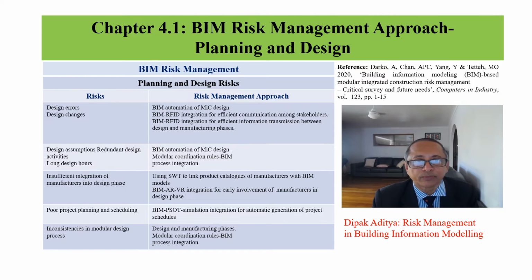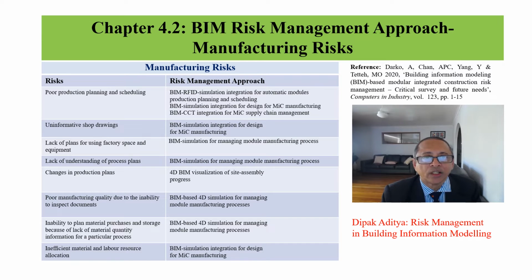BIM-based risk management approach. For the planning and design risk, the approach is automation of MiC design, BIM RFID integration, and modular coordination rules for inconsistency in modular design process. BIM risk management for manufacturing risk: the approach is BIM RFID simulation integration for automatic modules, BIM simulation for managing modules for the manufacturing process, and BIM-based 4D simulation and visualization.